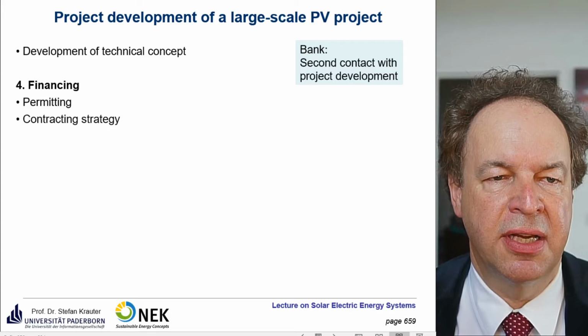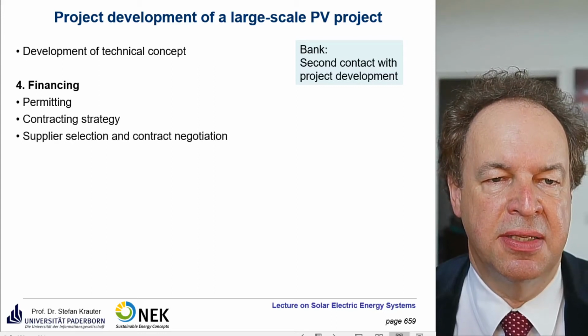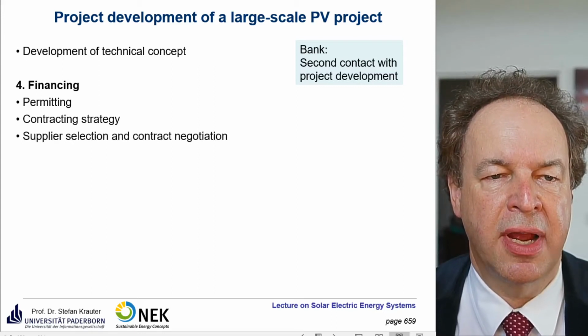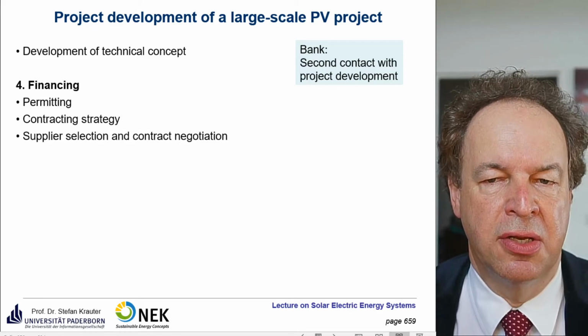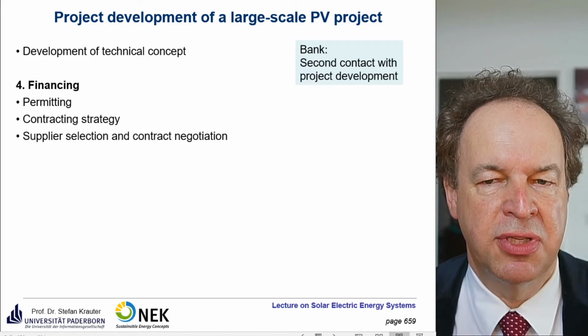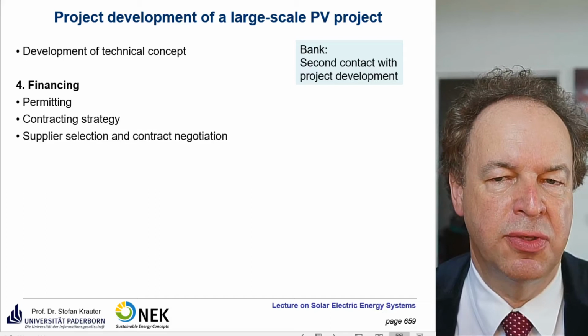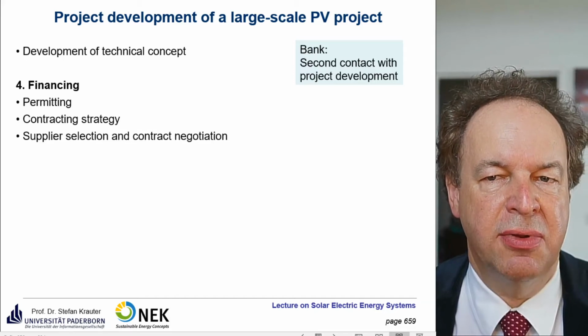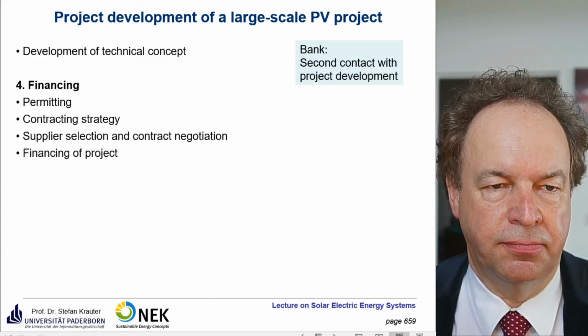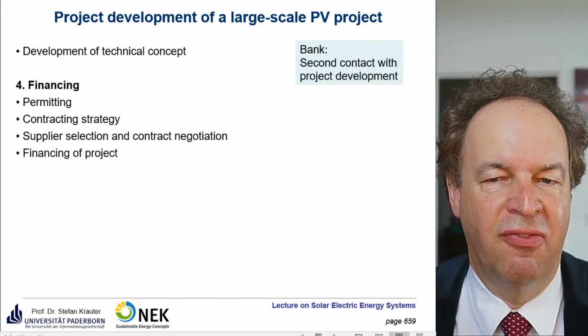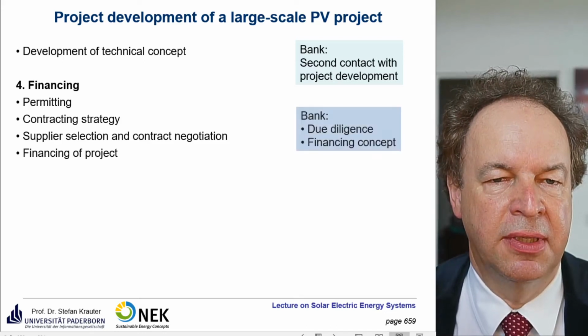The contracting strategy, supplier selection, and contract negotiation. So how much is the warranty? Is the warranty on site, or you have to send the modules maybe to China? How fast is the reaction time? And then it comes really to the financing of the project.